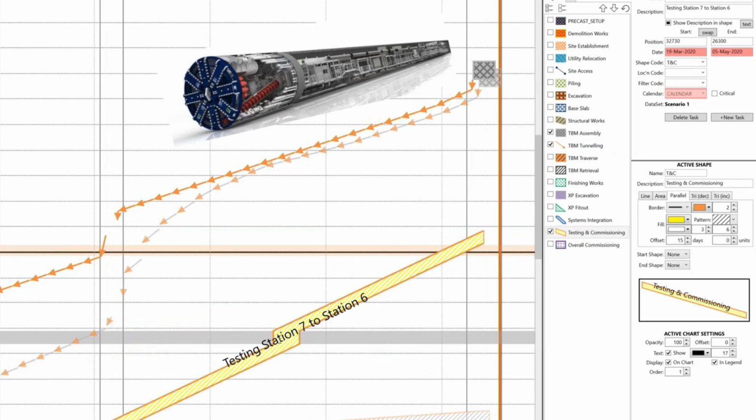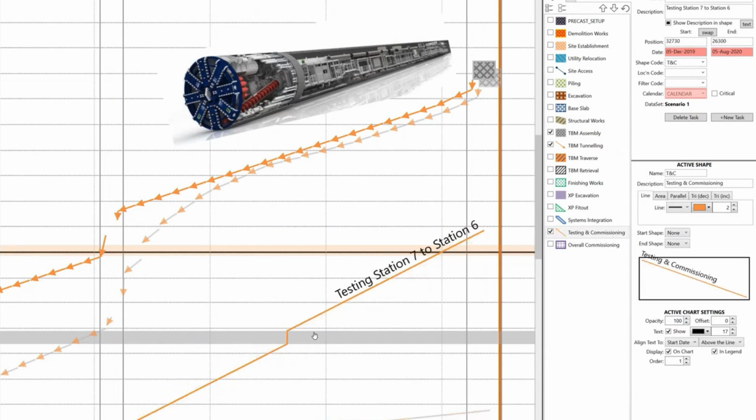We do have the ability to introduce calendar non-work periods, and they can change the angle of shapes. Now we don't import these from the schedule. The reason is, if you think about a typical Primavera schedule, the non-work periods are always weekends, and you constantly have this stepped function, which sometimes looks good, but most of the time is just distracting.